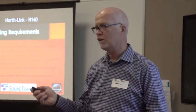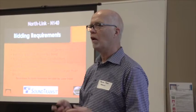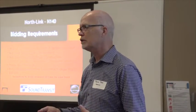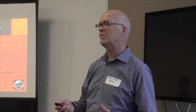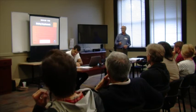Our policy at Hoffman Construction is any work that's in excess of $50,000 requires a performance and payment bond. That's not something you have to furnish with your bid documents, but I want you to be aware of that. There are minor exceptions. If it's a make-or-break situation, and especially a small entity that we're trying to help, then on a case-by-case basis, we can evaluate things like joint checks and progress lien waivers. But again, it's case by case, I can't promise anything.